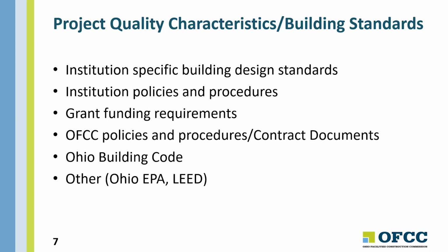If you received a federal grant or a grant from another agency or source, there may be some requirements attached to that grant. There may be some clauses or terms from the federal acquisition regulation that need to be followed, and sometimes those FAR terms, as we call them, need to be incorporated into the contract itself, or they can be implemented through supplementary conditions in a construction contract or special terms and conditions in an architect-engineer agreement.